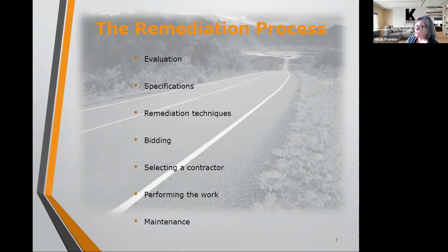comparable to each other. If you just put out a request for proposal without specifications, as you may have experienced in the past, you may ask 3 different contractors for a quote on a project, and you get back 3 different answers with 3 different scopes of work, and that's very hard to compare. So using an engineer to prepare specifications is beneficial in that you can see in detail what each contractor will charge for each specific portion of that project. And we'll talk about that a little bit more.